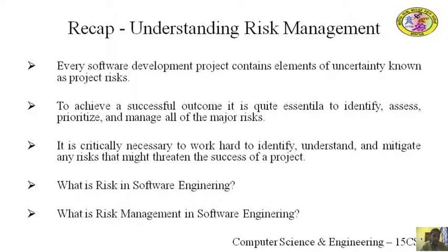Risk management includes the tasks of identifying risks and their triggers, classifying and prioritizing all risks, crafting a plan that links each risk to a mitigation, monitoring for risk triggers during the project, and executing risk mitigation steps. That is, implement the mitigating action if any risk materializes and then communicate the risk status throughout the project.